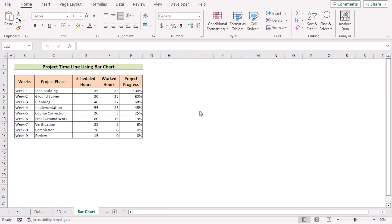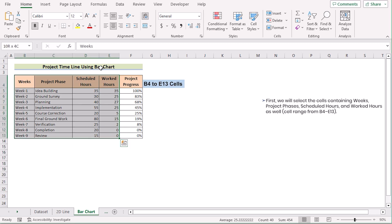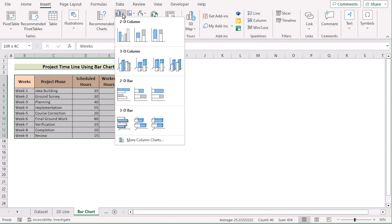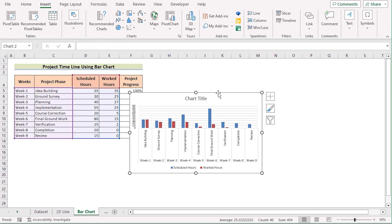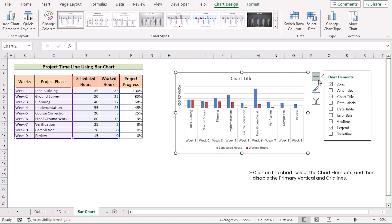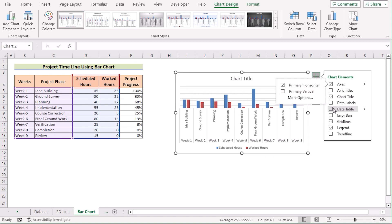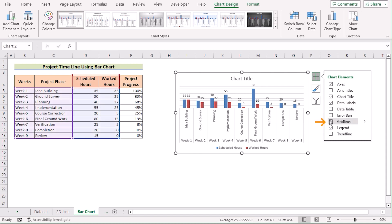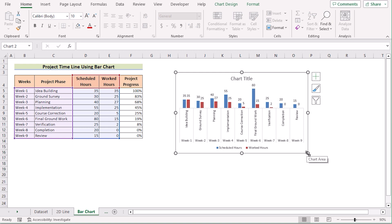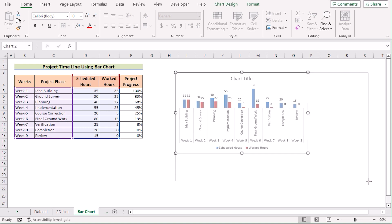We can also create a timeline chart by using the bar chart. First, select cells B4 to E13, go to the Insert tab, and in the Charts section go to Insert Column or Bar Chart, then select 2D Clustered Column. After that, go to Chart Elements, and in the Axis option untick the Primary Vertical. Then tick on Data Labels and untick Gridlines. Stretch it a little bit to make it visually more attractive.